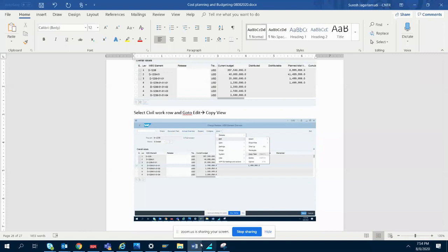Suppose it is up to him to release that entire fund. Generally they may not release the entire thing in one shot, isn't it? Here you can release the total overall value partially as well. This year he will release, and if it is multi-year, he will release only a partial part of it. Maybe 30% today, the next 30% another year, and 40% the third year. You can do it like that also. Are you getting what I'm saying now?